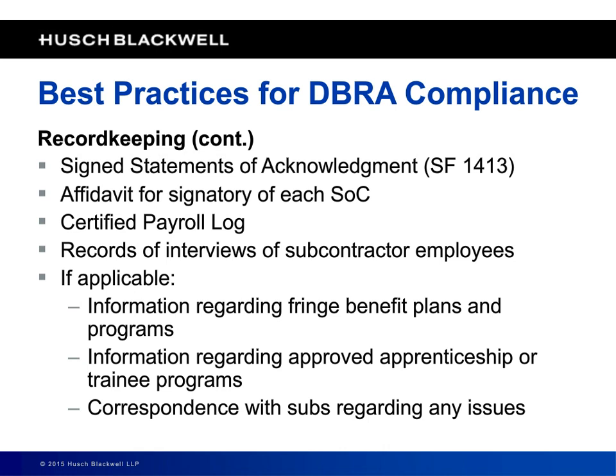Remember we talked about getting an affidavit for each and every individual that signs a statement of compliance, attesting to the fact that they have authority to sign that statement of compliance on behalf of the sub. Those affidavits, that's something that I'm keeping. Remember we talked about a certified payroll log where your certified payroll clerk is logging in each and every certified payroll and statement of compliance they receive, as well as documenting communications with subcontractors where discrepancies arise.